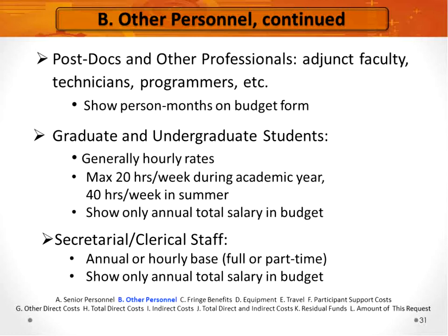You may, however, have other personnel or other professionals who will be compensated to help with your project. I've seen this category used for such jobs as a lab assistant, a webmaster, other technical support personnel, or a project coordinator. Secretarial or clerical support can be included only in very limited specific circumstances. The NSF Grant Proposal Guide, Chapter 2, Section G on Budgets and Budget Justifications provides specifics.